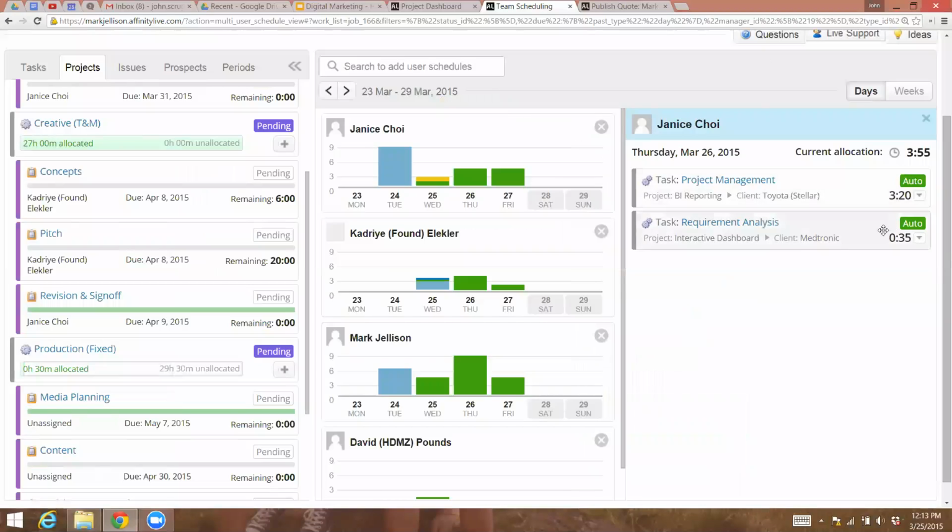Oh, so you just put in how many hours a day you want the person to work, and then you say the amount of days? Right. So if I have a 10-hour task and I'm assigning it to 5 days, then it's going to block out 2 hours on each of my days automatically. And if I were to do it over the span of 3 weeks, would I have to remove weekends, or does it automatically do that? It automatically pushes over based on what you've designed as non-work days for a particular company or people. Got it. Okay.